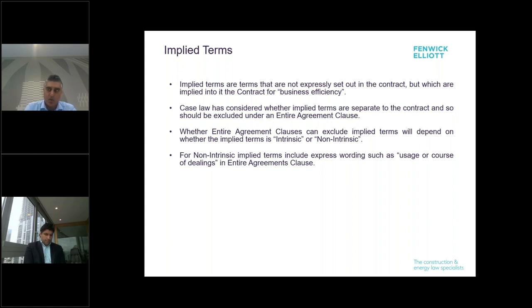And again, when it comes to implied terms, the courts have had to decide whether an entire agreement clause can actually exclude implied terms. What the courts have had to look at and consider is whether an implied term is separate to the contract, and so can be excluded under an entire agreement clause in the same way as a pre-contractual statement is, or whether they form part of the contract generally and therefore cannot be excluded. I think the case law has shown that when it comes to implied terms, the courts are looking to differentiate between what they refer to as an intrinsic implied term and a non-intrinsic